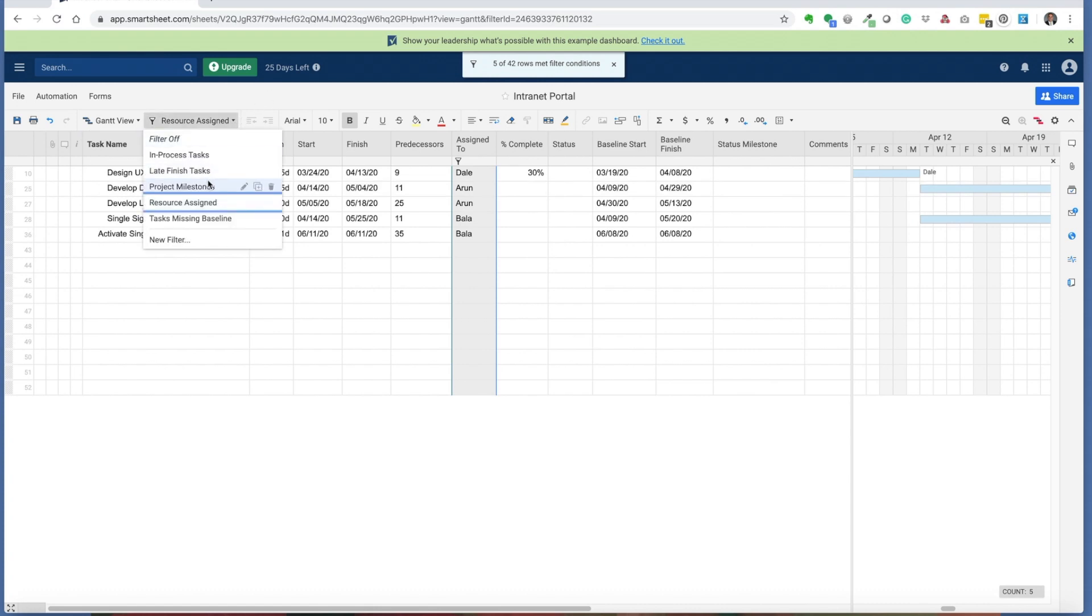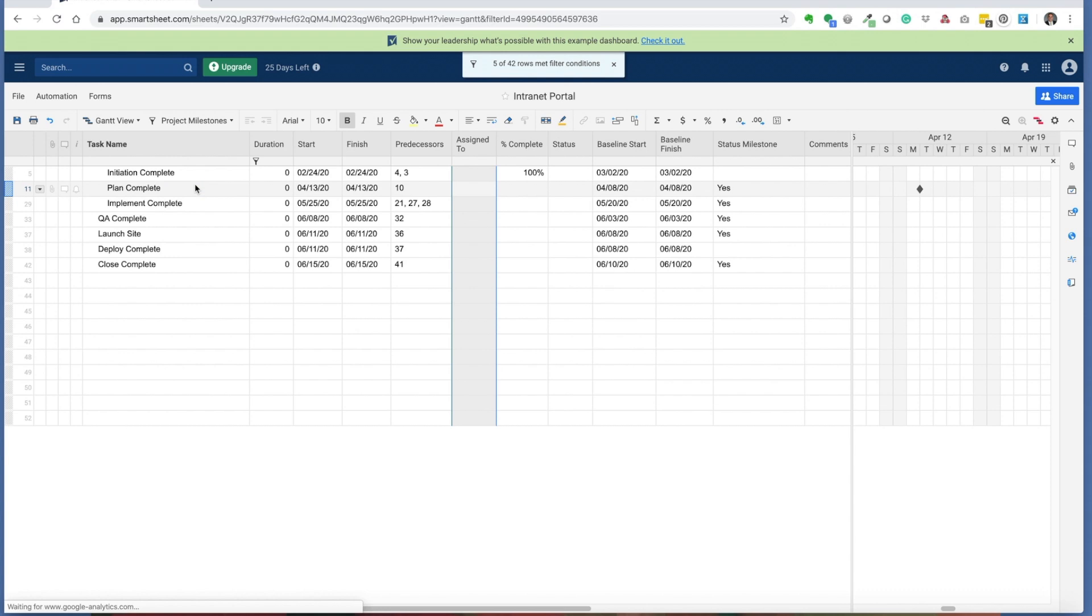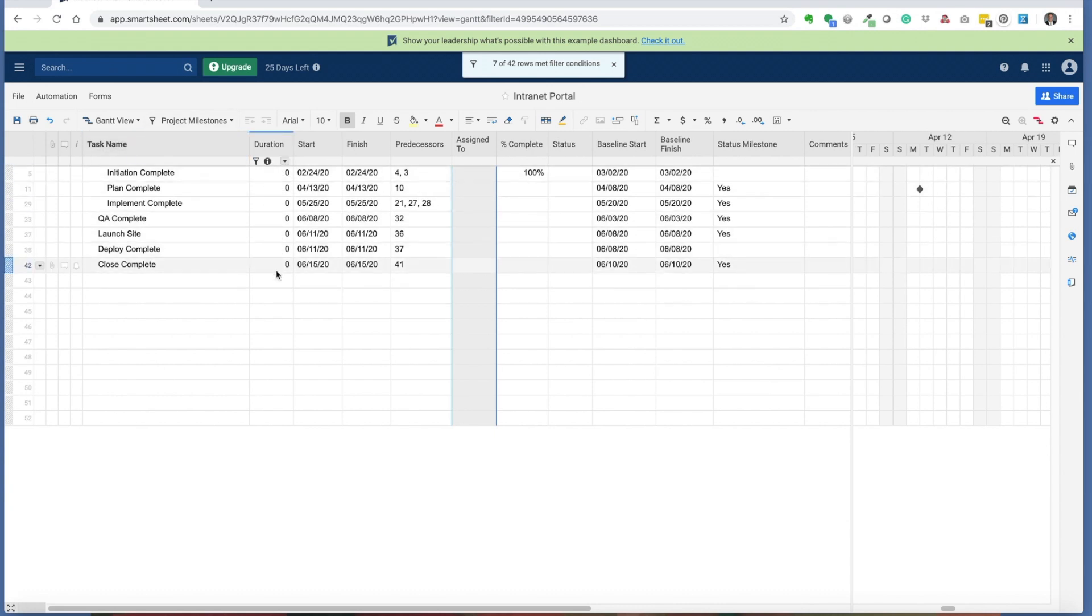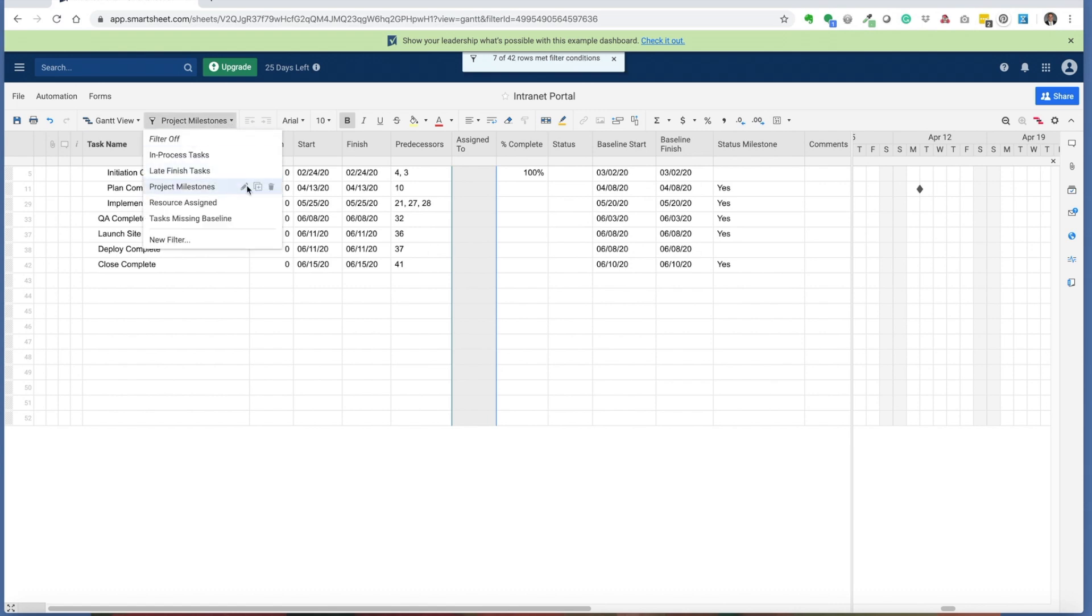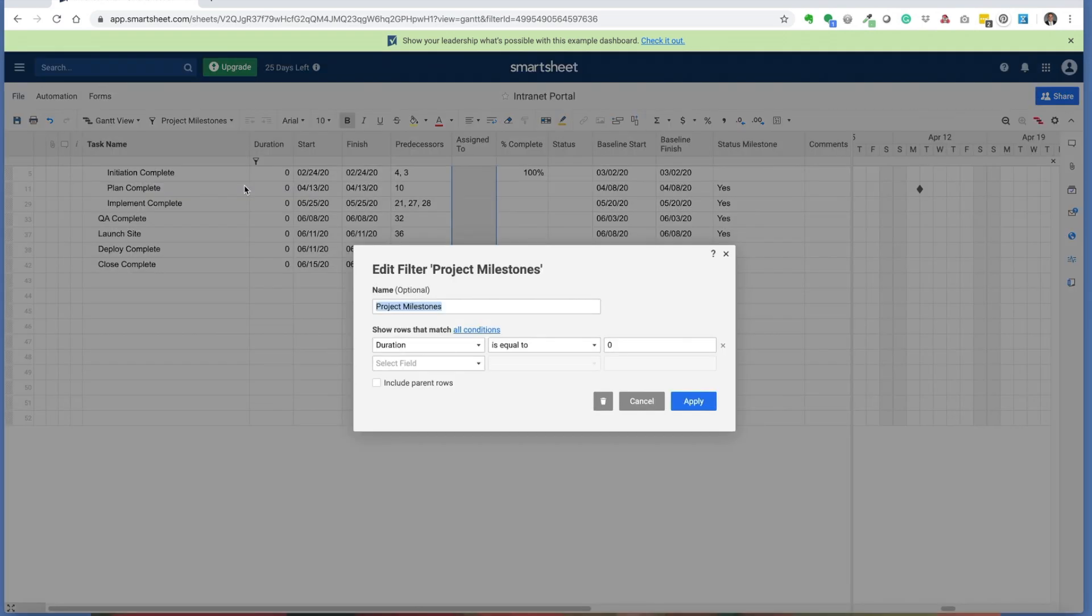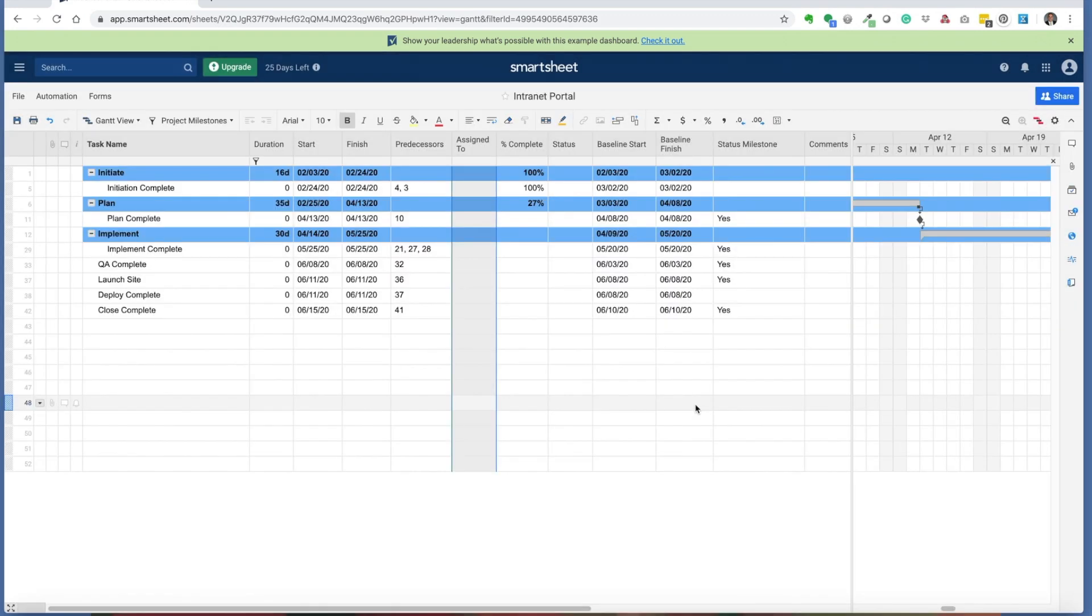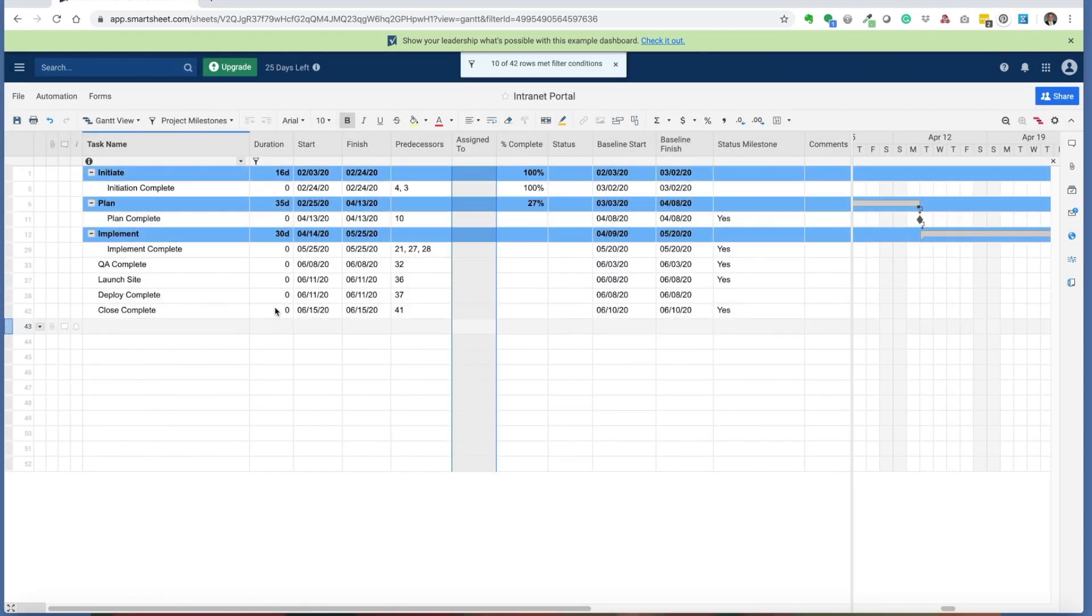Finally, the last filter that I want to share with you is the project milestones filter. A project milestone is by definition a zero duration task. This filter is simply picking up the zero duration milestones, and it's built by creating a filter that shows the duration is equal to zero. There's a couple different ways you can use this filter. If you want to just get a milestone list, or if you need to see it within the parent rows, that shows you all the milestones that are set up within a given phase.